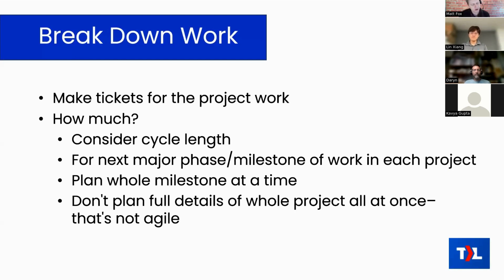If you're using Scrum and you've got sprints, you need to be able to see what needs to be started in the next sprint, and do planning for that milestone. So if you've split out your project into certain milestones, key deliverables, and you'll have capacity to start this milestone of this project within the next sprint, then you need to take the time to break down that milestone into its tickets, so that you're ready to start that at the beginning of the next sprint.